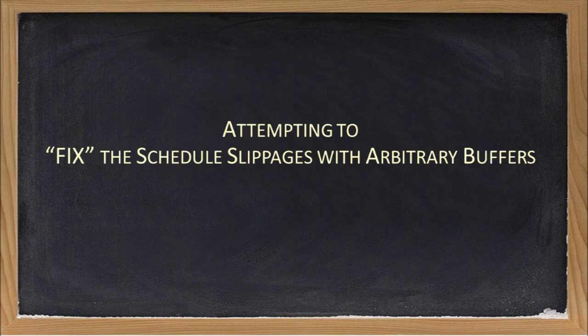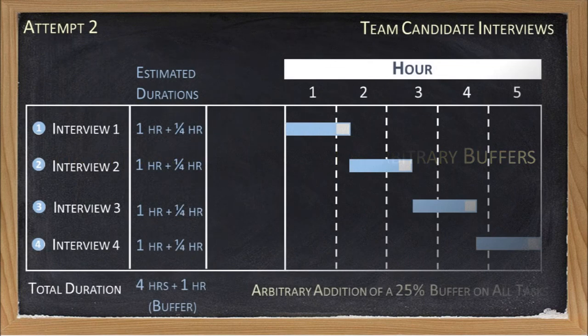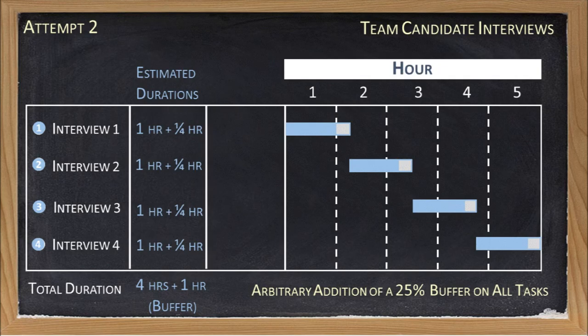within the schedule to accommodate variation in task durations. Let's return to our interview schedule, but this time we will, across the board, add a 15-minute buffer to each of the interview times, in the hopes that this will keep us on schedule. You often see this strategy with inexperienced project managers who add buffers into their schedule in the hopes of developing a schedule that they can actually keep.